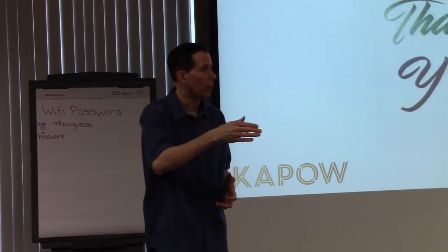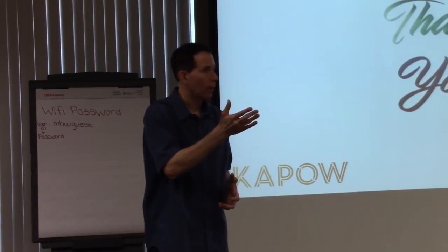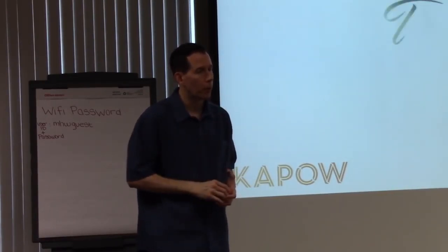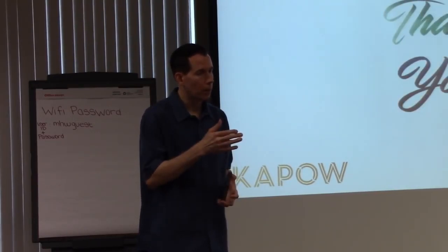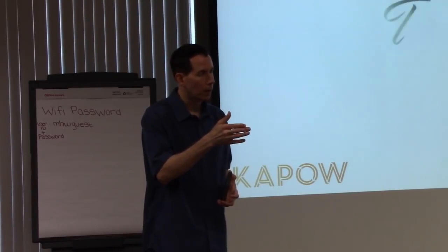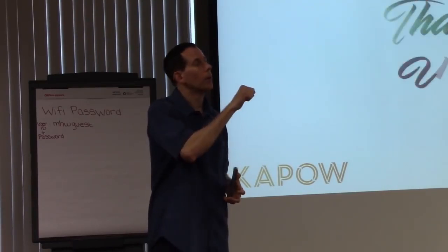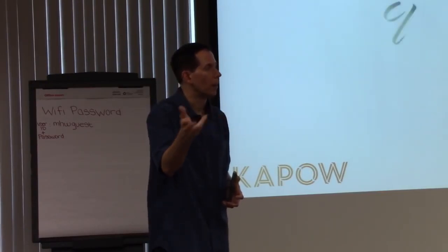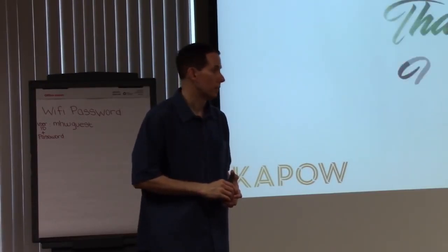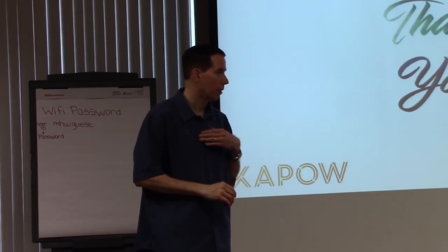So when we got things going, for the very first one we did, I put in the design for what needed to be put in. And then we started from there. And so as we go to the next sprint, the design work that we're doing, we already did in the previous one. So that helps product management plan what's coming out in the next release and everything. That's just the way I decided to do it there.